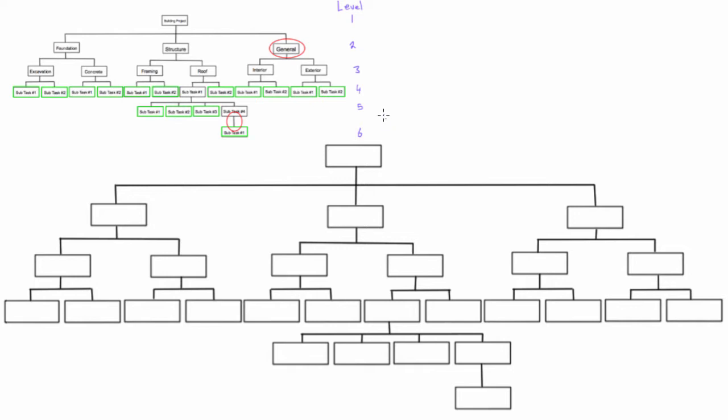First, for level one, we don't use numbers. We'll simply write the project name. I'm not going to be able to fit that all in there, so we'll just call this 'project'. You'll simply label that as the project name.